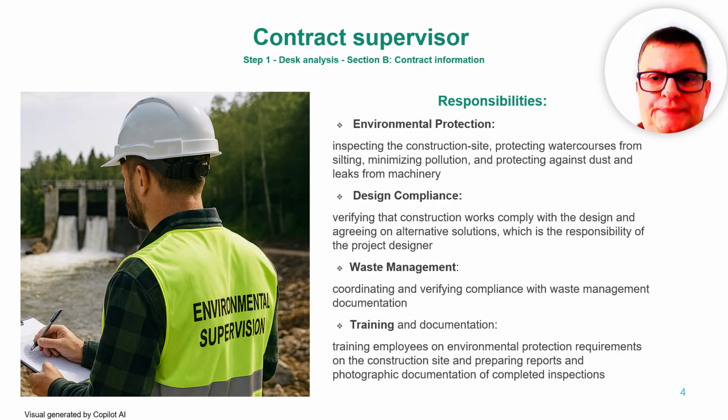Environmental protection. One of the big jobs in contract supervision is keeping an eye on the environment. That means regularly inspecting the construction site, making sure watercourses don't get clogged up with sludge, keeping pollution to a minimum, and checking that machinery isn't leaking oil or creating too much dust.